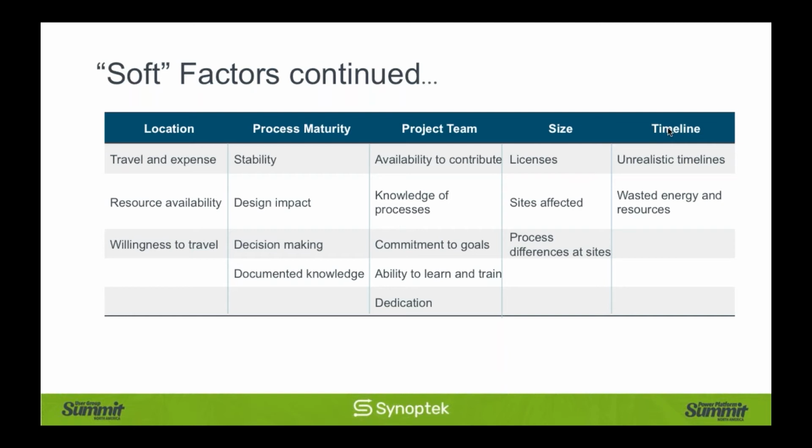It has a direct relationship, because if you are trying to nail down a standardized process in your ERP platform, and your business is still not clear on how it's going to handle processes that should be pretty clear, if you are going to be implementing D365 and your processes are not mature, then it is harder for your organization to make stable business decisions or firm decisions, because your process is still in a growth phase.